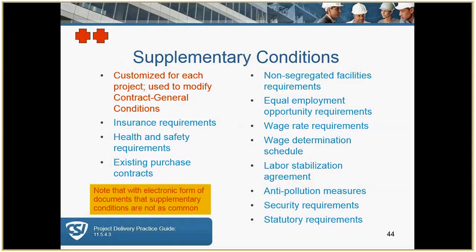Because of the fact that there are standard general conditions, keep this in mind. If you know the A201, everybody knows what an A201 includes. If you're a decent sized contractor, you can simply reference it instead of include it. But you also need to make some changes to it.